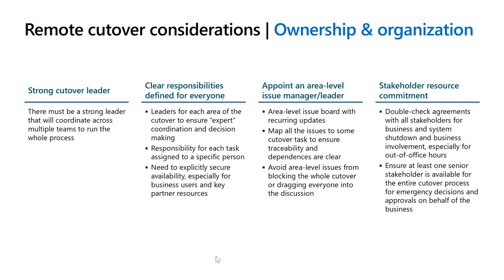Absolutely critical that you double check and confirm the agreements with all the stakeholders for the availability of the resources that you're expecting for the go-live cutover period. Often this is during holiday periods or weekends, certainly out of office hours. And you'd be surprised how many people then don't turn up because the commitment is so loose that they feel that they can do other things and just turn up as and when they're ready, right?